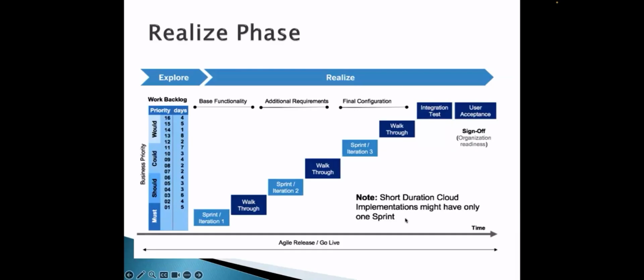So once the project has started, you work for say 6 weeks, 45 days. Then in the 6th or 7th week, conduct a meeting with the client and showcase whatever you have done in the last 6 weeks. You might have just done the very basic design. It's been just 25 to 30% that you're able to configure. Showcase that. So here the client will get an opportunity to look at the design that is happening.